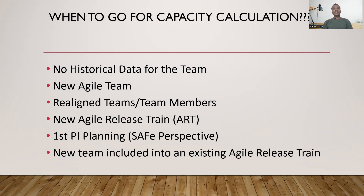And even if it is an existing Release Train, but if in case the Release Train was extended or expanded and we got some new teams on board within the Release Train, for that given set of new teams added, we will be recommending the capacity calculation. For the remaining teams, they will go for the velocity calculation.